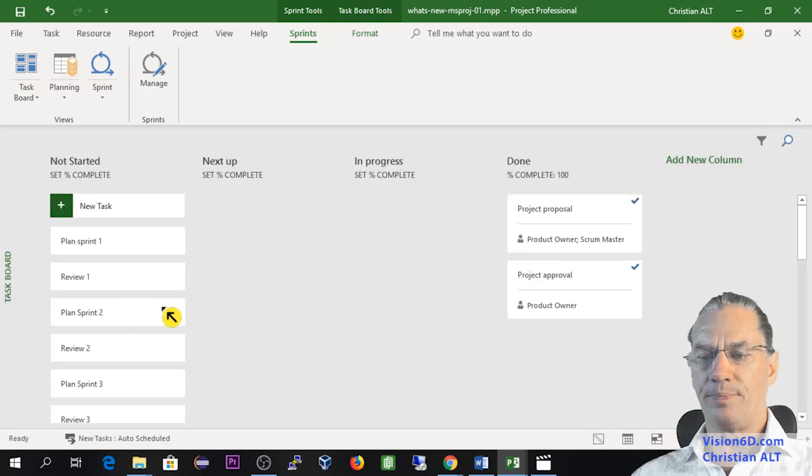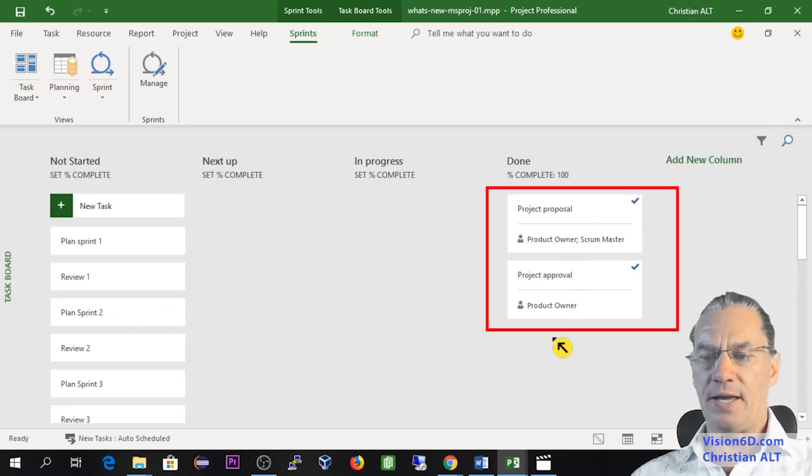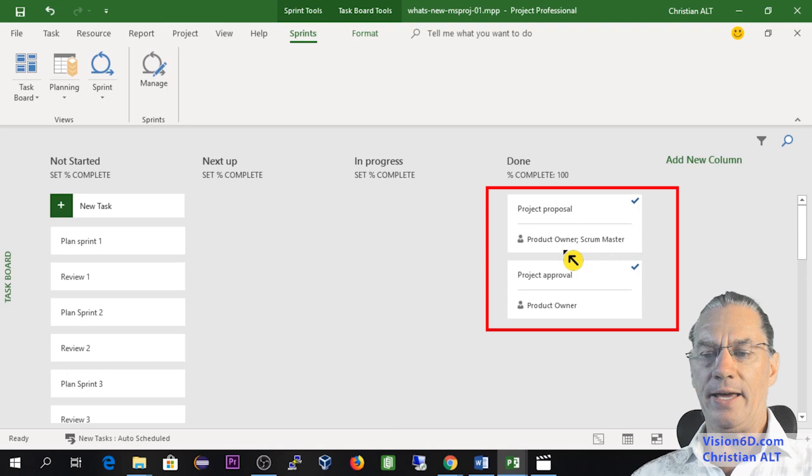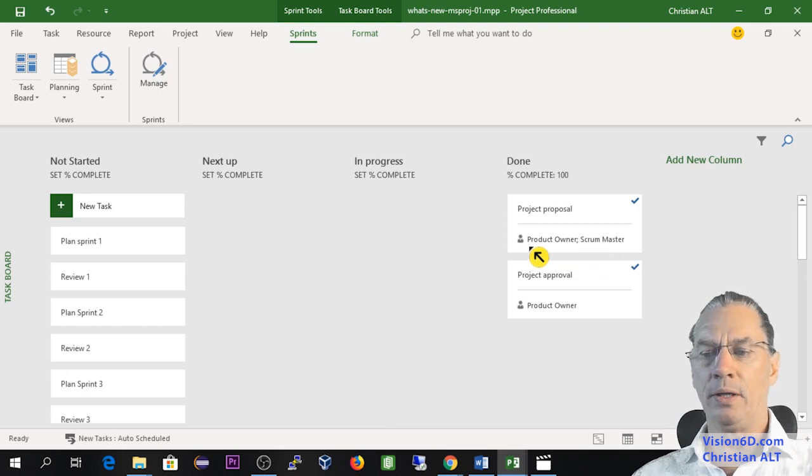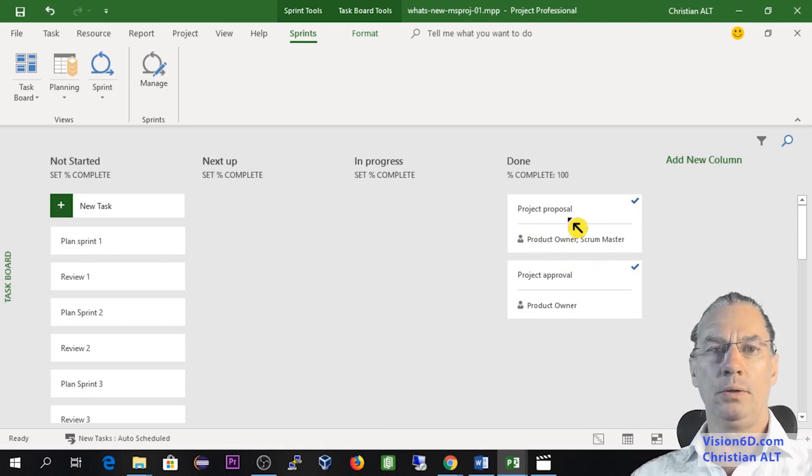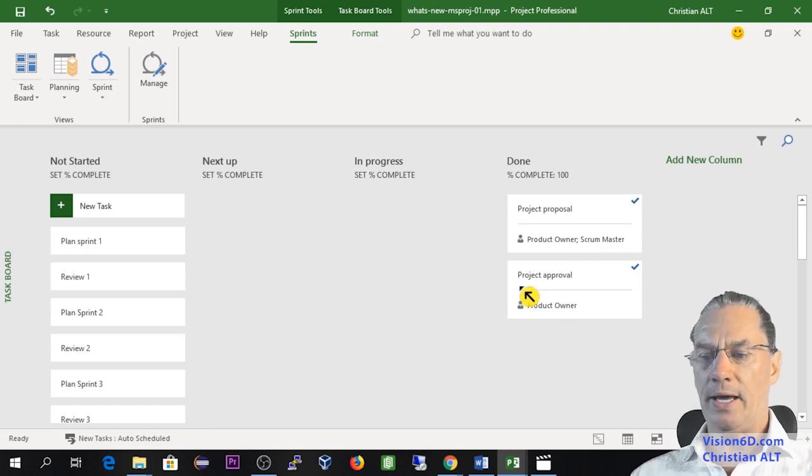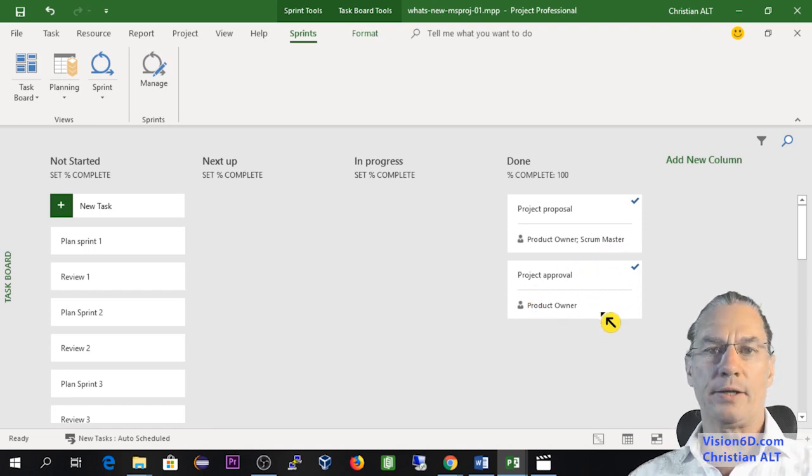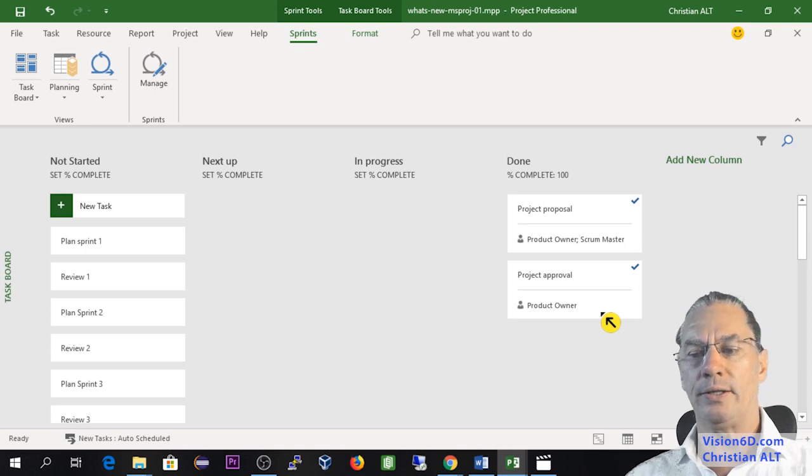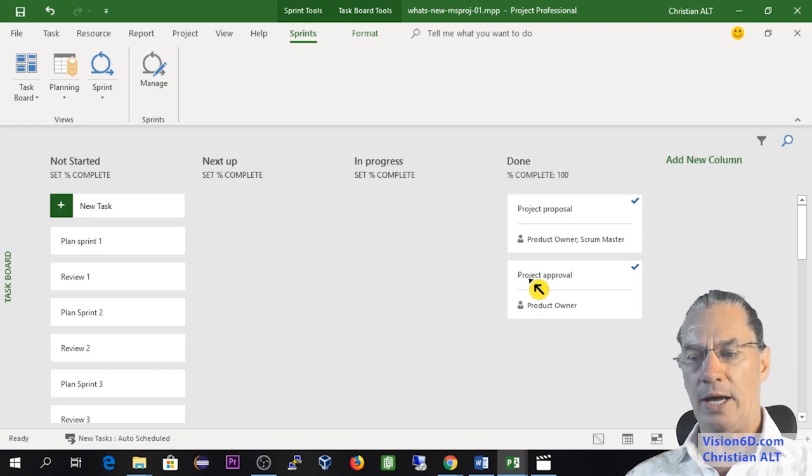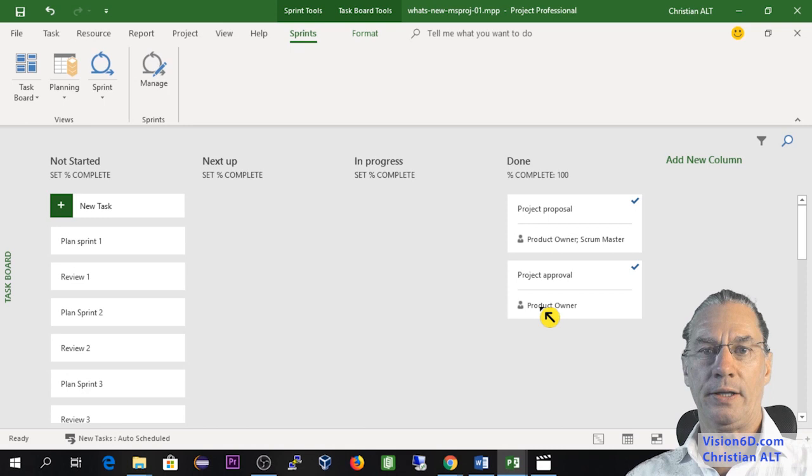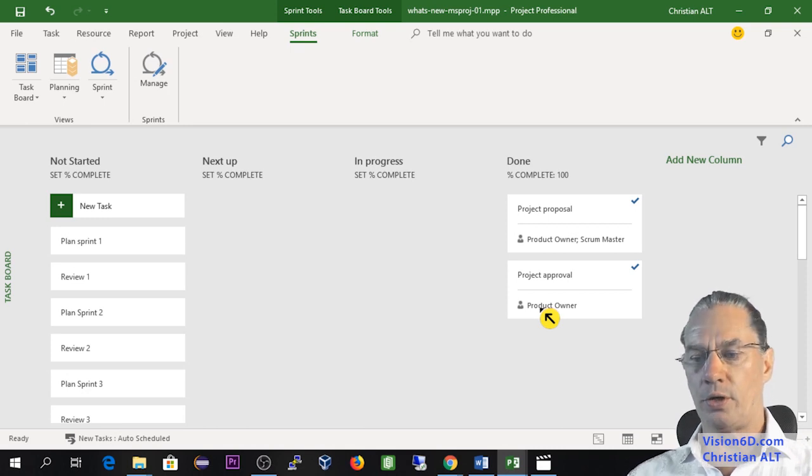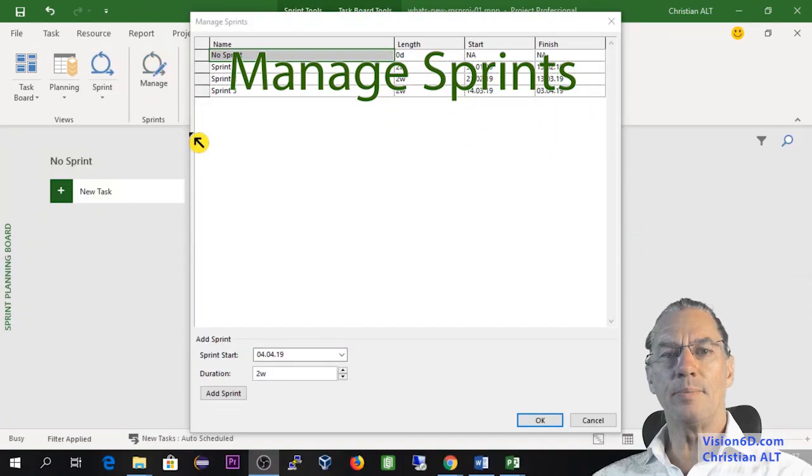To the task board, you see that the tasks that were done I had added resources to them, saying that the proposal is made by the product owner and the scrum master, and project approval is the product owner. Remembering you that product owner can be a customer or it can be somebody within your own organization.